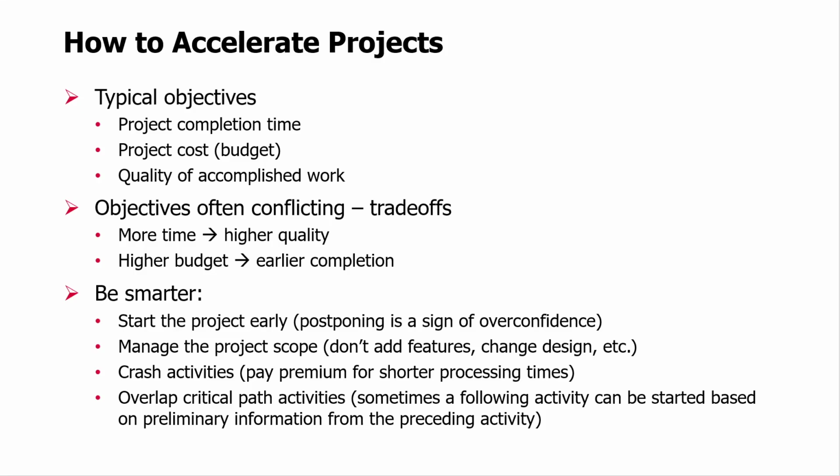In general, some advice is useful. Right? Be smart. Start the project early. Even the activities that have a lot of slack, start them soon, because postponing might cost you delay. Right? An activity with a large slack, if delayed, might become critical, and a delay in it might then cause project delay.